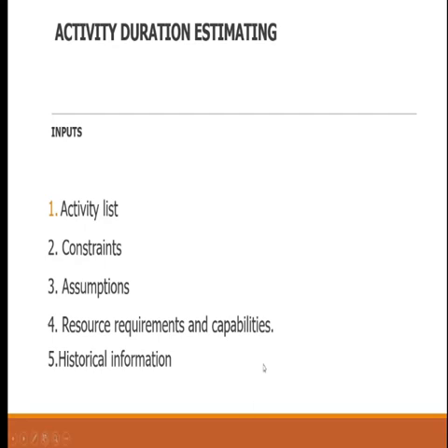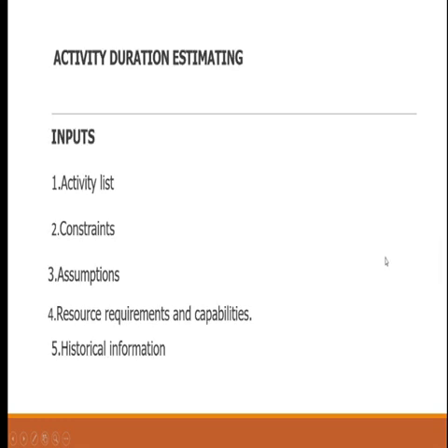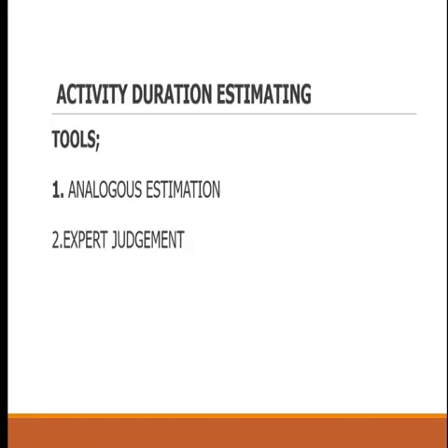Then number 5, know your historical information before you can estimate the duration. If you have done such a job in the past, Google and find how long it took you to do the job, and that can be a good input to your present time estimate process. Let's look at the tools.